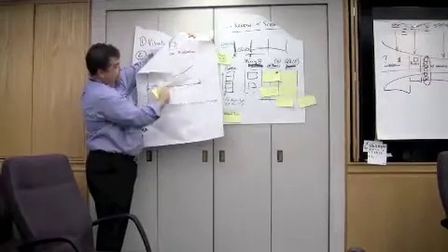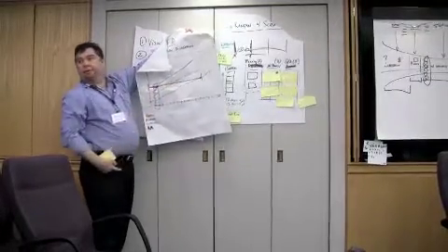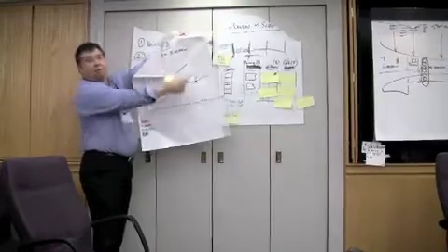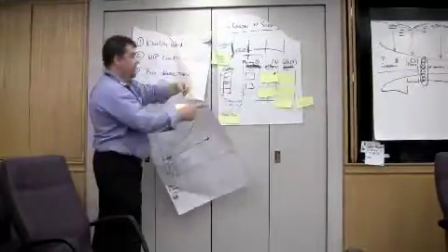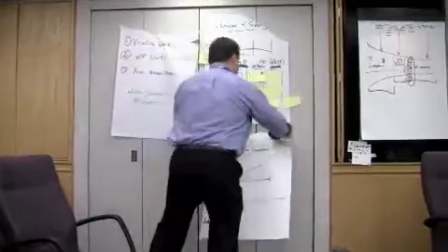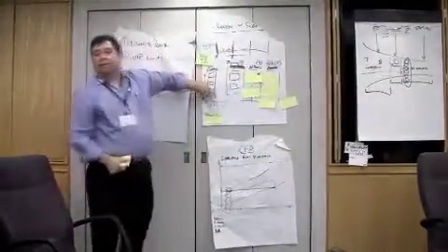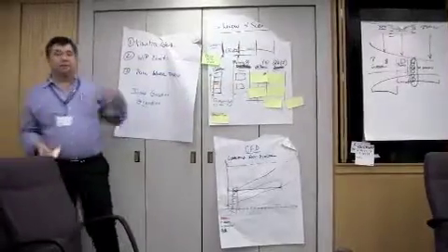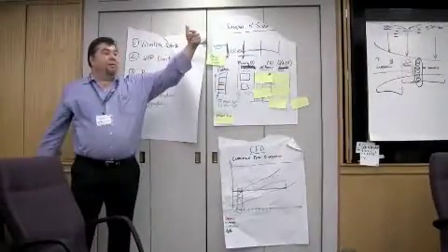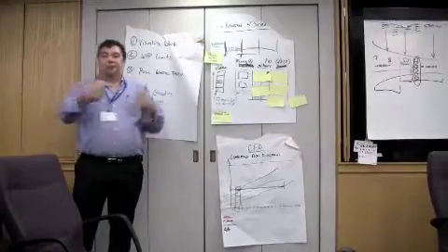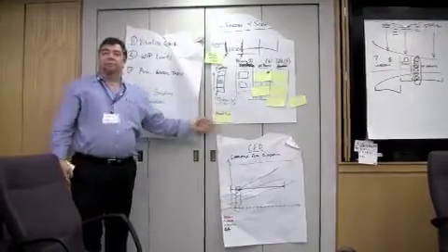That period of time from there to there is cycle time on that card. Lead time is add the front part, when did I ask for the card and it got out. So over time, a team can track lead times on your cards, and you start to look like the rides at Disneyland. You know, next offering of this ride's in 34 minutes. You've got very accurate lead times.